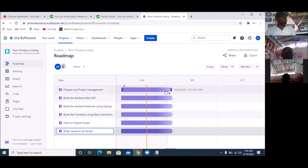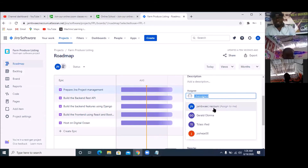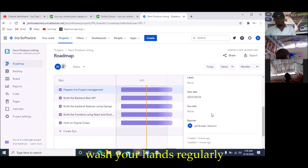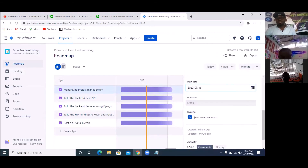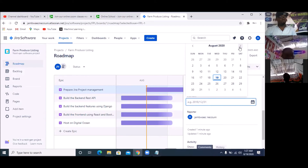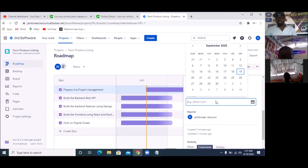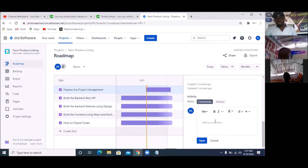Having created all the epics, I can now assign dates to all of them. I'll take this one and expand it. I can assign somebody to this — I'll assign this to Obina and Gerard. The start date is today, the 19th. When am I supposed to stop? Let's put this one at about one month out — let's pick September 2nd. You're reporting to Jambwaecnecouni. Under comments, I will say 'Report to me as you progress'.